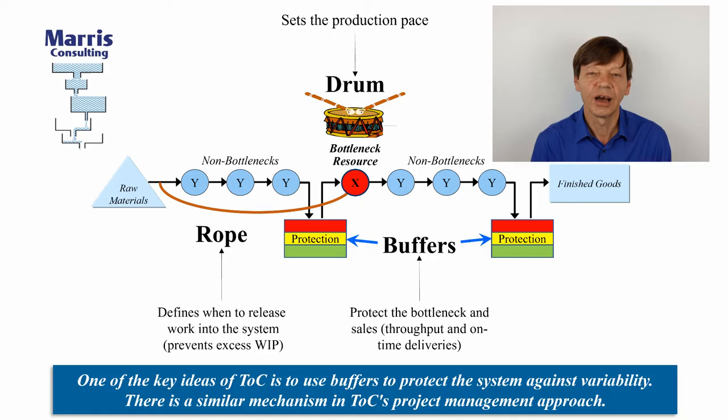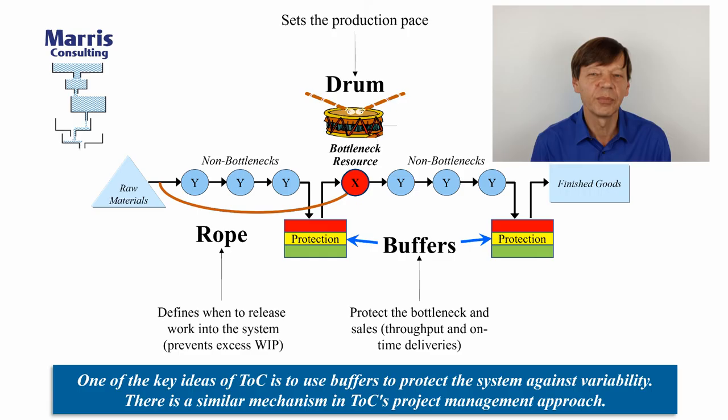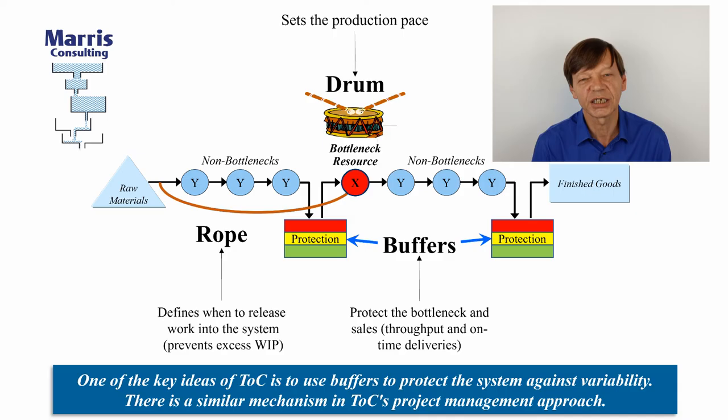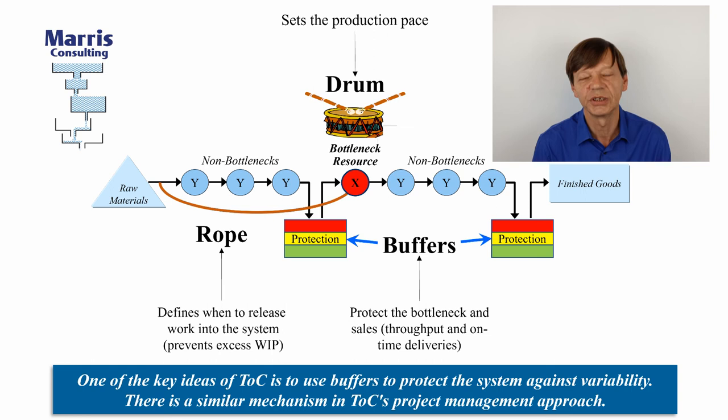If you do that, you have a very simple but powerful system with maximum sales, minimum inventory, and 100% due date performance. Some people say drum-buffer-rope is so good it's kind of dangerous because you can get good performance out of a bad factory. Let me conclude by underlining the buffer, because I think this is something not always well understood about the Theory of Constraints. The full name could have been the Theory of Constraints and the Management of Variability and Uncertainty — and you can see it here with the buffer, and even more so in project management with critical chain.